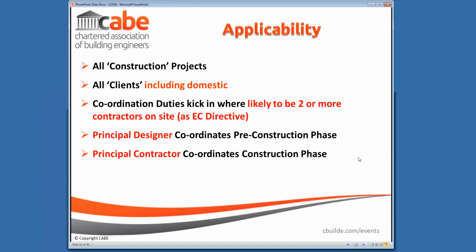This does, however, raise the question of what actually happens during the construction phase when design changes occur. Most projects need an element of design during the construction phase, and a lot of what are now being termed sub-designers, but we would see as specialists like the M&E consultants, the structural engineer, the fire engineer, may not be on board until work is actually on site and their element of design is being done at that stage. Now, the principal designer will be coordinating their work, but obviously the main responsibility for the health and safety is under the principal contractor once we're on site.